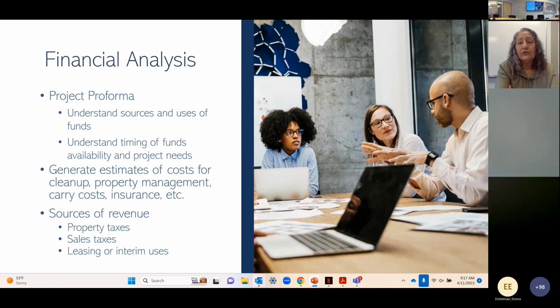Investors will often have metrics such as an IRR, an internal rate of return, that is very time sensitive. And if a project takes 2 years instead of 1 year, your IRR will be cut in half. It's a very one-to-one relationship between the time it takes to do a project and the calculated IRR.